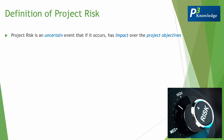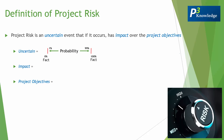Project risk is an uncertain event that, if it occurs, has impact over the project objectives. We have here three highlighted words. The first is 'uncertain' — it means it has a probability, and this probability or likelihood has a 1% to 99% chance of happening. So what about 0% or 100%? They're actually considered certainty or fact, and of course the way we treat facts or certainty is quite different than the way we treat risks.